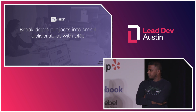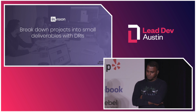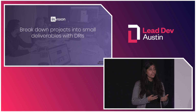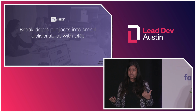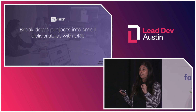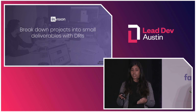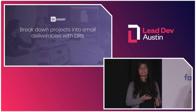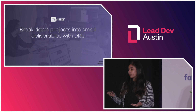When we started, we said, we want to revamp our engineering handbook or build a new one, so let's just rebuild this, and that was our goal. A quarter in, in quarter two, though we were doing work, it didn't feel like progress to us because we'd set up such a big goal to achieve. So in the recent quarter, what we learned is to break down your goals into small milestones or achievable targets. We set specific goals saying these are the areas we want to address in the handbook, and we assigned specific owners to them. So break down your project into small deliverables and assign ownership to them. That we achieved; we went beyond the target we set this quarter for the content we wanted to add to our handbook.